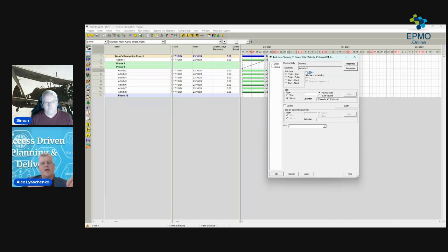So let's assume what happens if I do the first two activities, which are my predecessors, boil water and put tea in a cup. But then I decide to do my successor later because the predecessor is done. I will do my last activity tomorrow. I will put water in a cup, so the water will already be cold. Yeah. Which means it is not just finish to start, but a strict, immediately-after dependency. Yes. So if I'm not able to pour the water straight away, I maybe need to delay my predecessor as well. So sometimes you need to link activities so they just move like that. Yeah.